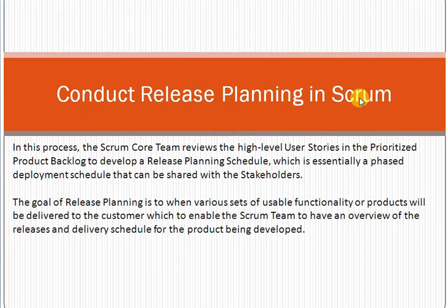However, in the Scrum framework, we divide the work in chunks. For example, if there are 40 tasks, we can make 4 sprints, and each sprint will contain 10 tasks. So in each sprint, we will plan, develop, test, and deliver it to the customer. Then in sprint 2, the same exercise will repeat. In sprint 3, the same exercise will repeat. In sprint 4, the same exercise will repeat.